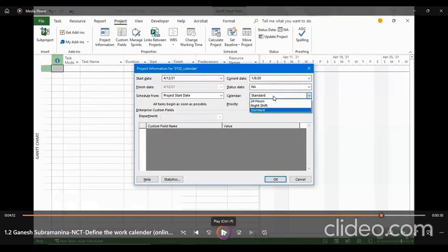If you set up another calendar to be your work calendar, this is where we need to apply the calendar for the project. Hence, in this case, actually, we are good to go. I'm not going to do any changes, but if you want to add another calendar, you can add it here. This is how we define working and non-working days and times and set the calendar for a project.